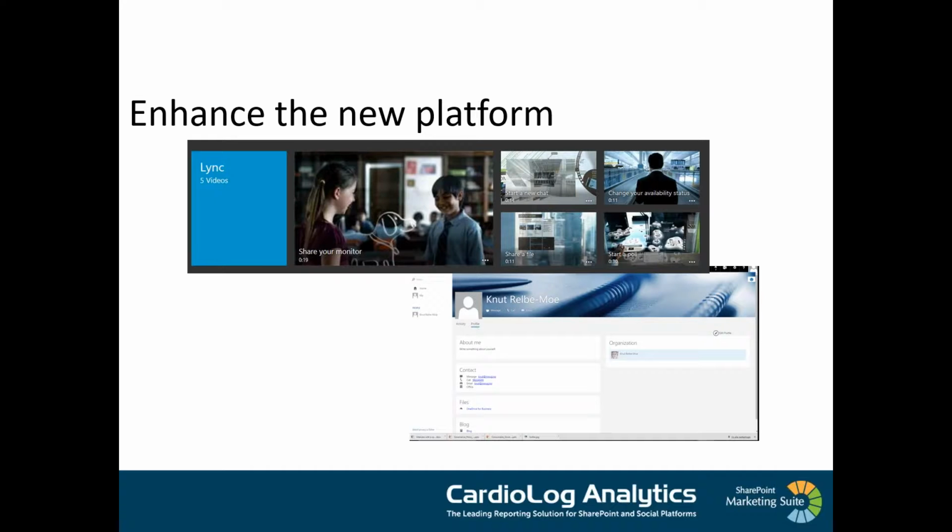So make sure that, as we saw earlier, one part of the steps is to analyze the data. Even more important is the fact that you analyze your target environment. You will check everything which is running there. Check if you have some custom code running, some farm solutions, or some assembly information which you need to migrate also. And then you need to know your target environment, because to be able to migrate from something to something, you need to know both sources.